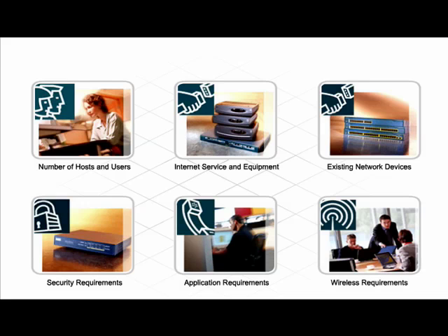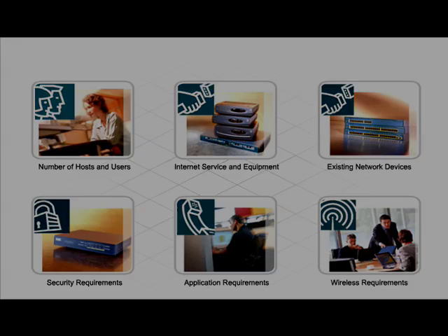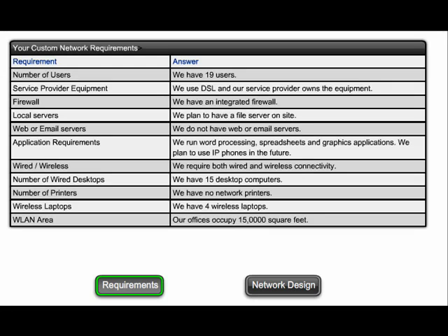Before a network upgrade can be properly designed, an on-site technician is dispatched to perform a site survey to document the existing network structure. It is also necessary to investigate and document the physical layout of the premises to determine where new equipment can be installed. A site survey provides the network designer important information and creates a proper starting point for the project. It shows what is already on site and gives a good indication as to what is needed.